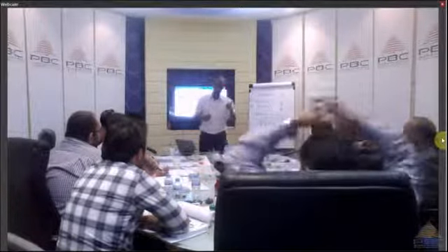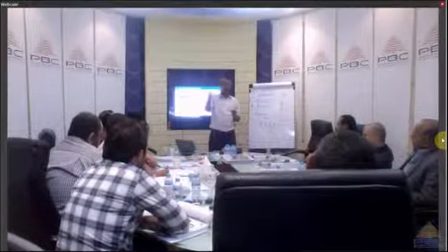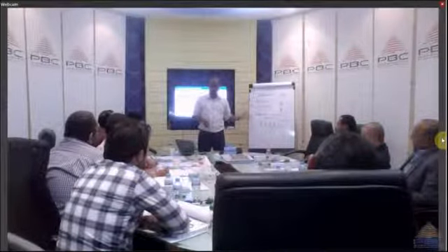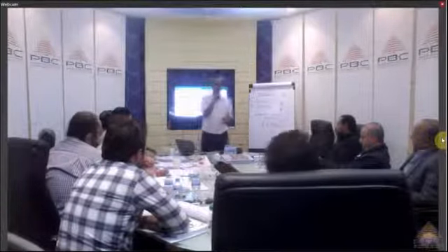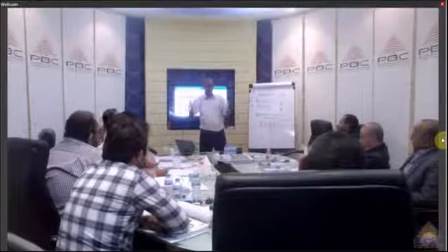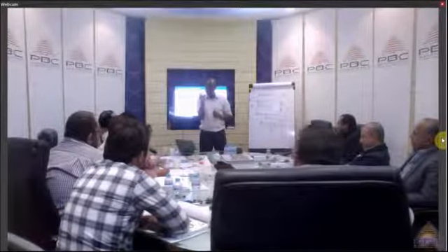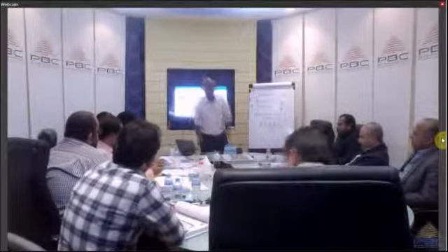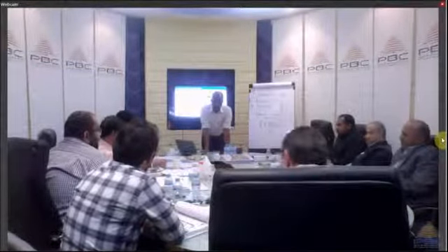Either I will say my project total duration is this, and I'm going to have 5% extra just in case for duration and maybe 10% for cost. Or I do it activity by activity. So I'll say 7 weeks and a small note saying 5% of that duration is reserved just in case. So you have to announce your reserve percentage. Sometimes some companies do that also. They make an internal schedule. If they have a 12 months project, they make an internal schedule for the others.